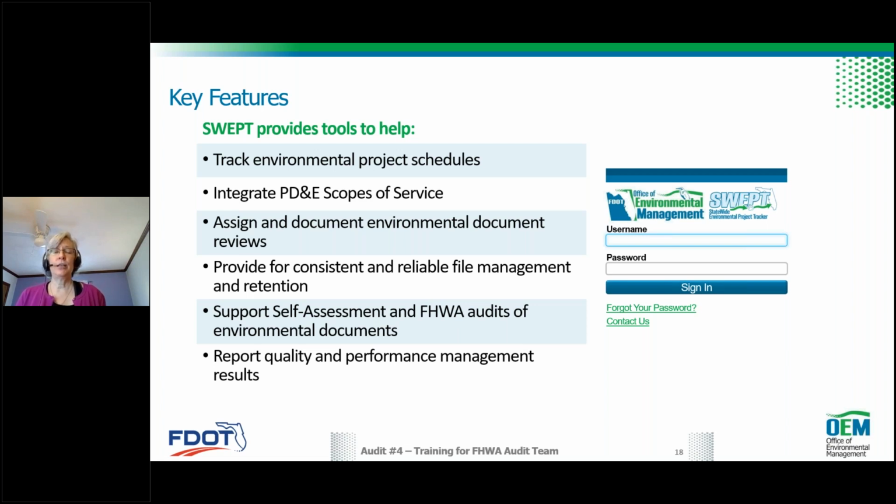We also assign and document the environmental document reviews. In some cases, we need a subject matter expert to review a specific technical document, and so we'll assign it to that person. We also have a standard naming convention for our files and a standard way of organizing them, storing them, and moving them to our department's environmental document management system, and that helps us keep it all consistent for our retention and file management requirements. And of course, like in this instance, it is helping us support the self-assessment and FHWA audits of environmental documents and report the quality and performance management results so we can keep track of that and monitor that.